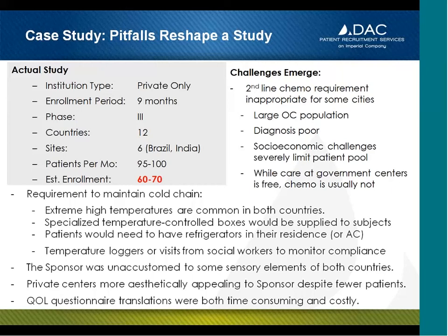Last but not least, there was a quality of life questionnaire, as I mentioned. And these were things that had to be translated and validated in those countries, which is going to require a tremendous amount of time and be costly. And that also had to be taken into consideration with regards to the timelines around activation of sites and getting these countries up and running.